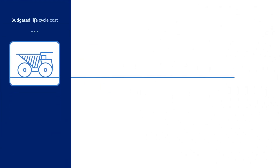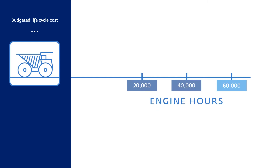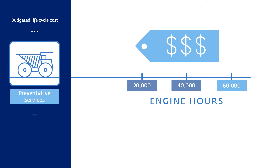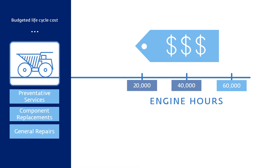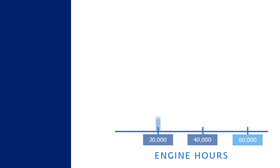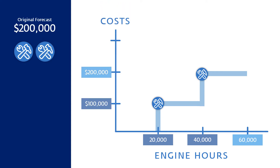For example, this truck has a life expectancy of 60,000 hours. When it was purchased, the total cost was calculated based on a lifecycle strategy that included preventative services, component replacements, general repairs, and even a retirement plan. The strategy is to replace an engine every 20,000 hours, so over its life there would be two engine replacements at a cost of $100,000 per engine.